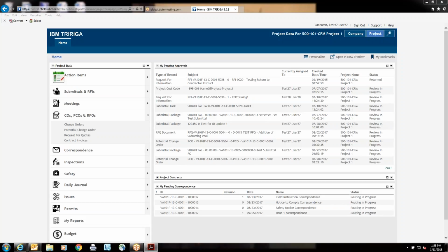So with that said, with the tracking information needed, again, like Lori stated, you will need to do your pencil copy with your contractors, get your AIA forms together before you start creating these invoices. Another word of warning here with invoices is that invoices have to be entered in the order that you're paying them and by the change order. So if you want to issue and complete an invoice before another one, you have to make sure that your change orders are in there correctly. Otherwise, you have a potential to have your dollars get a little skewed when you start looking at your budget.